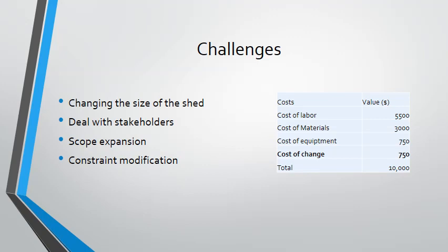As a project manager, I saw that those changes were possible to make and I accepted them. I let my neighbor know that we would need at least 2 more days to complete the project. So I convinced him that the changes were possible to do as long as he allowed me to extend the date for at least 2 days.